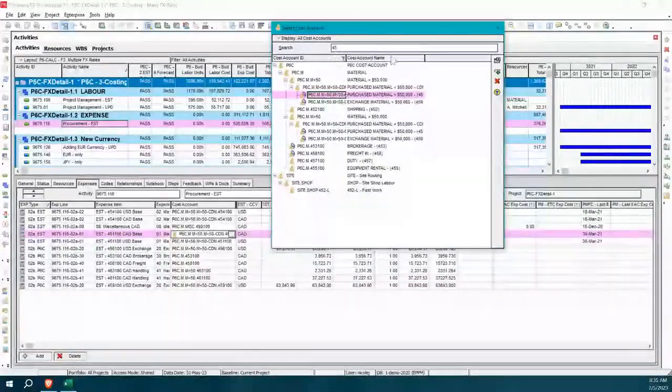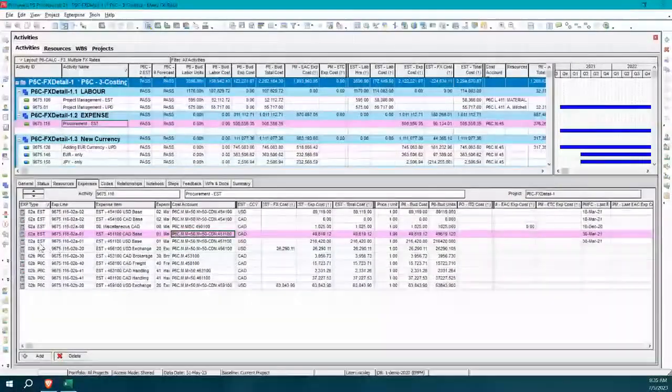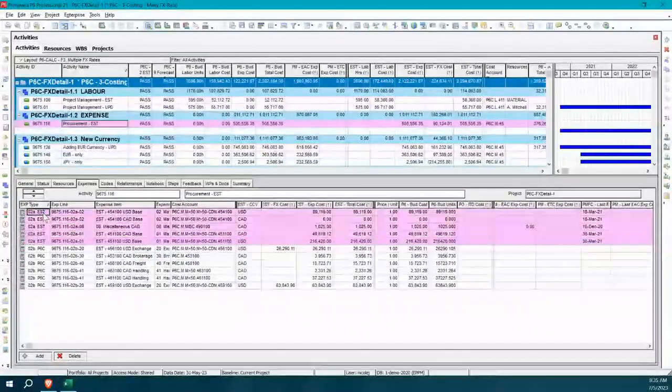Every client's going to have a slightly different twist. So in their example, they had it bundled by whether it was a large item or small item in terms of dollar amount. That's how they did their cost accounting. So small items had certain brokerage, freight, and handling, and larger items had a different percentage, which makes sense. Hopefully on the larger items, the brokerage fees are a smaller percentage. So that's how they had it. That's why this looks a little complicated. We have quite a few lines that we get on the estimate.